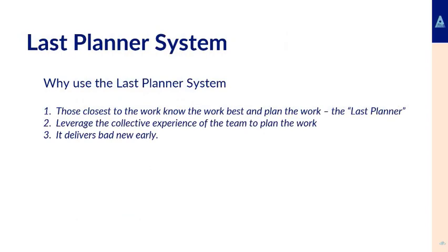So why use the Last Planner? There are some benefits of using it. Those closest to the work know the work best and can plan the work, i.e. the Last Planner, leveraging the collective experience of the team to plan the work. Instead, a lot of plans are worked on by maybe a project manager and a planner, somebody driving a planning piece of software, Microsoft Project or Asta or some of these planning tools. So this is trying to get the people who know the work and fully understand it to best plan out all the activities. It delivers bad news early.